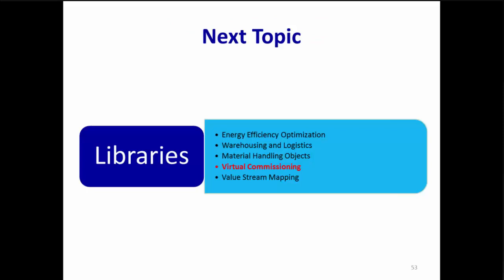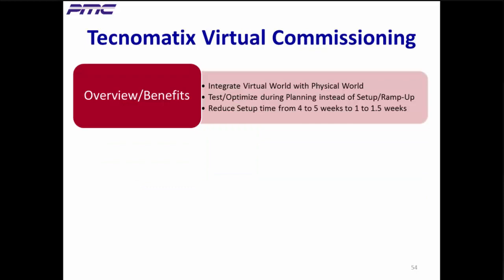I hope that gave you a good idea of just how many different objects Plant Sim has for material handling. Our next topic is virtual commissioning. Setup and ramp up of the systems implementation for robotics and automation is called commissioning. Traditionally, this step is done after the physical system is built on the shop floor. Technomatix virtual commissioning lets you test and optimize commissioning during the planning and design phase in a virtual environment that takes into account equipment like robots, PLCs, conveyors, light barriers, etc. without any risk to the real facility. Doing this cuts typical setup and ramp up time from four to five weeks to one to one and a half weeks, reducing time to job one.